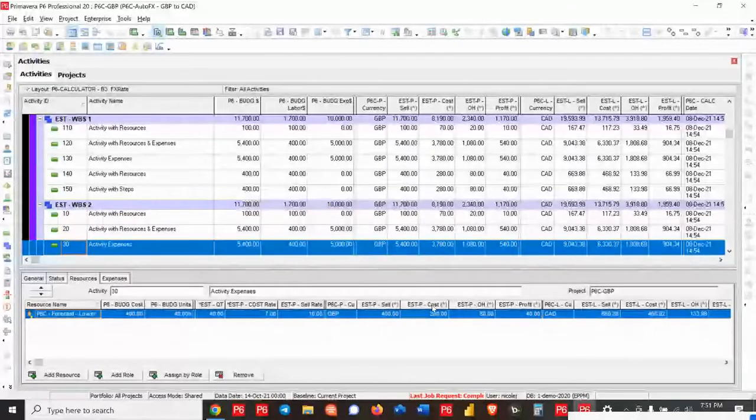That is how we automate the roll up. It's a symbol that we choose. It doesn't have to be that. It could be a different symbol. And that automatically, without any changing in programming, rolls up the values to fields at the activity level, at the WBS level, and at the project level.